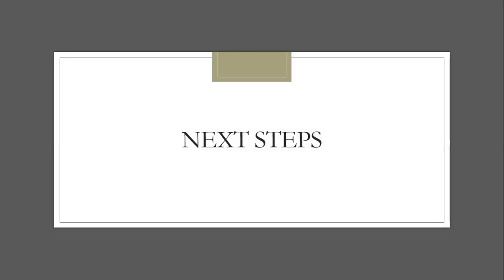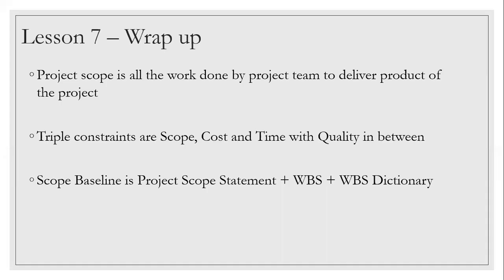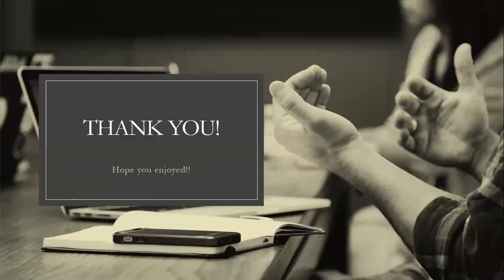With that, we came to the end of lesson seven. A quick wrap-up: project scope is all work done by the project team to deliver the product of the project. Triple constraints are scope, time, and cost with quality in between — maintain an equilateral triangle. The scope baseline is your project scope statement plus WBS plus WBS dictionary. In lesson eight, we're going to talk about WBS in detail with a hands-on exercise. Thanks and cheers.